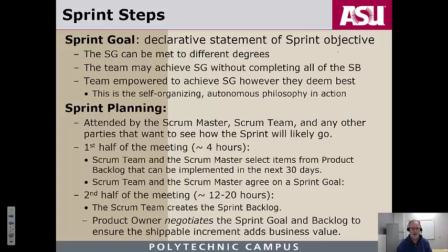some of the items deal with a database, and some of the other items deal with user experience. Some of the other items deal with some kind of application logic. You kind of know where your resources are for that particular sprint or the next few sprints. You also know that you can't build certain screens in the user interface, let's say, until certain database tables are available because they provide the data to fill in the screens. So you may want to do things in an order that's slightly different than the business priorities set by the product owner.